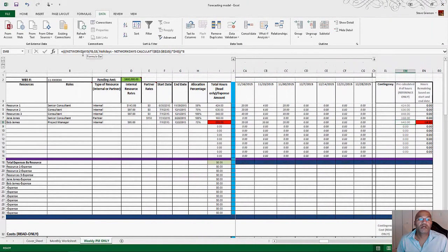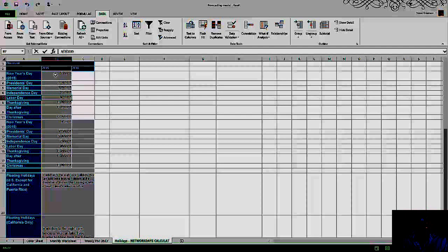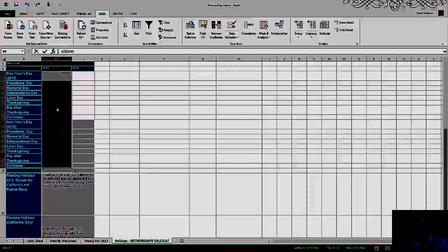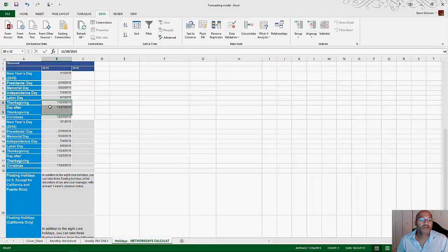So between the period of 7/1 to 12/2, there's a holiday, and I will go ahead and unhide the field that I tend to use for doing my holiday calculations. And here I have listed in 2015 as well as 2016 my holidays. If you notice, we have Thanksgiving that falls between the date for the project manager, so we have to take into account those 2 days.